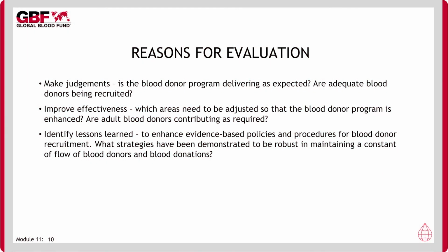It is important to note that there are 3 key reasons for conducting an evaluation, and at least one of these must be apparent in the evaluation exercise for it to be a valid activity. Evaluation is conducted to inform judgments on whether the donor management program is delivering as expected. It will help assess whether the strategy being employed should continue, be adapted, or stopped altogether. When adaptation is needed, evaluation can identify which areas need to be adjusted so that the overall program is enhanced. Lastly, evaluation can identify lessons learned, as this will assist in future program development and establish evidence-based policies and procedures.